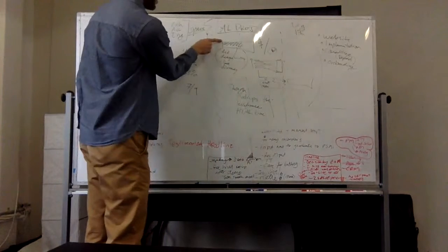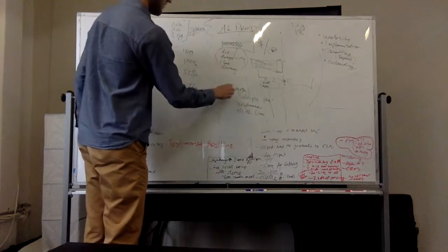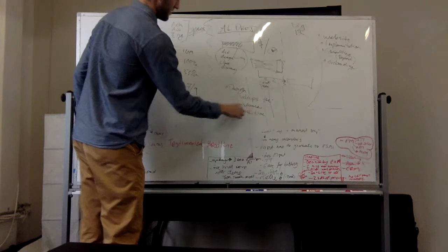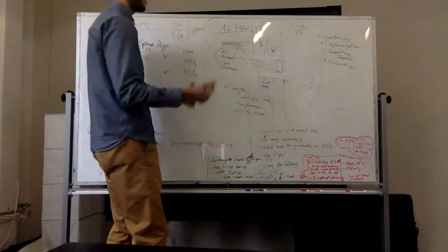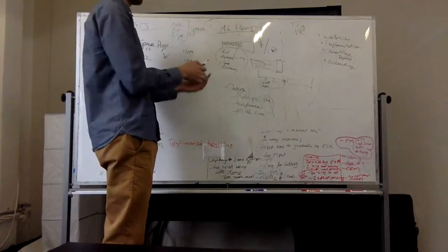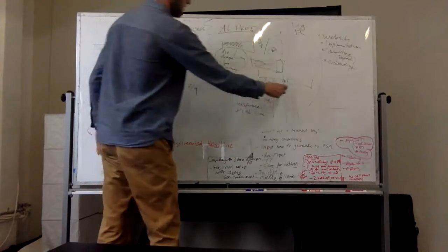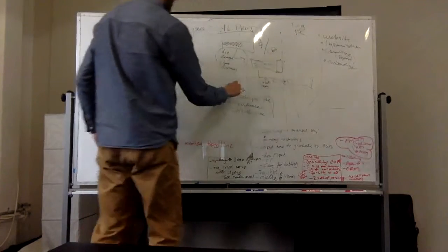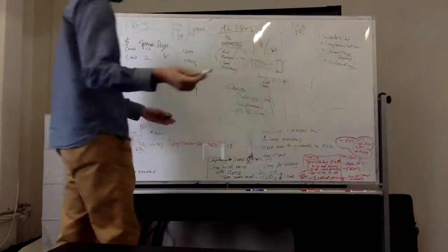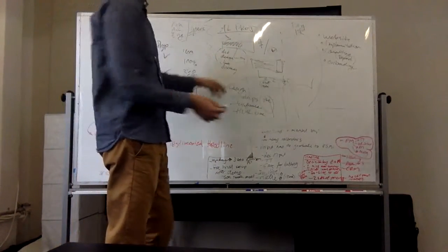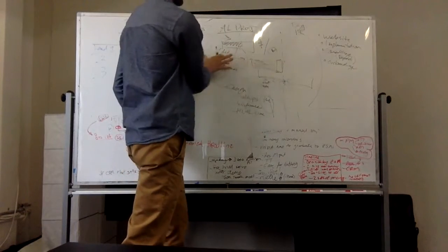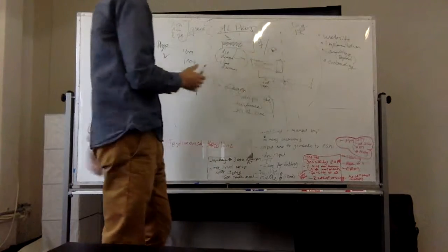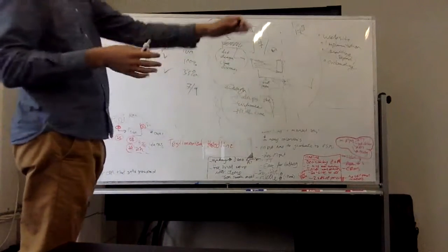Which looks dangerously close to the way a Gantt chart is set up, with a milestone and tasks that fall underneath, and some sort of time-based tracking both on the hours and the dollar amounts, and when you're actually delivering it. So taking that Excel structure and moving it into a Gantt chart is great, because they don't have to update all these little times and dates when things shift and move around, because we have a Gantt chart structure. Got it. For the overall waterfall approach.